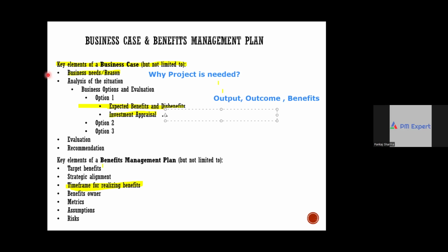Can we first talk about commercial projects? Then we'll talk about the other projects, which are non-profitable in nature, right? You do investment appraisal of all the options, and whichever is best, you will select it. Now, how do you do investment appraisal of a commercial project, first of all? Commercial ones are done for profit reasons, right? For investment appraisal, you require two things: benefits and cost both.